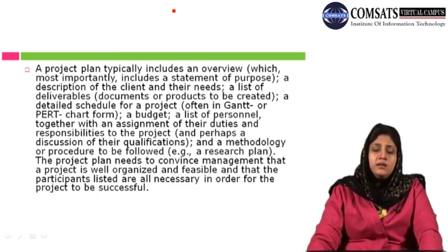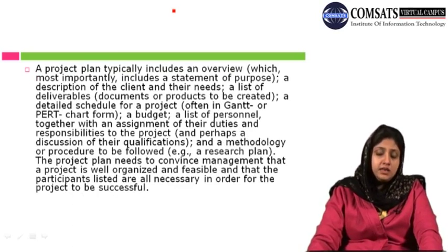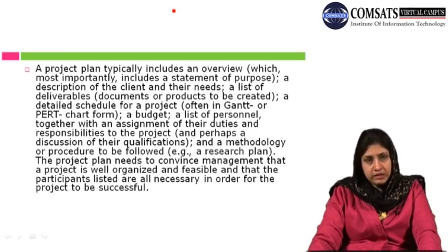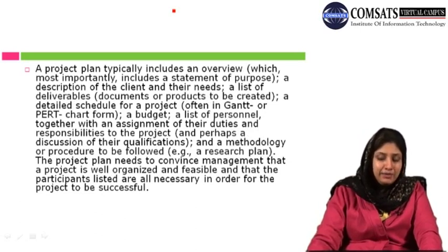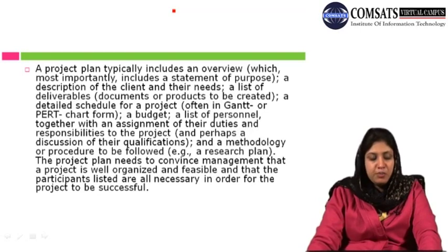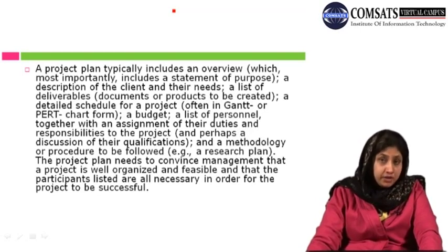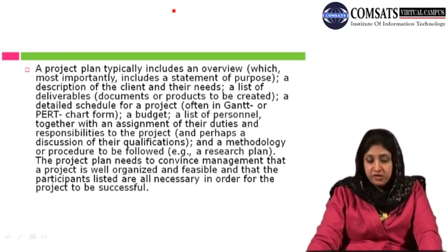And a project plan typically includes an overview, which most importantly includes a statement of purpose, a description of the client and their needs, a list of deliverables, all the documents or products to be created, and a detailed schedule for the project, a timeline, often in Gantt or PERT chart form, and a budget detail.